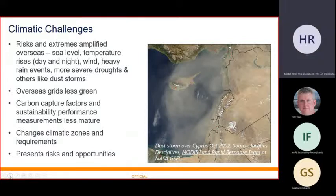We're also finding that the changing climate is adding uncertainty to our projects. So for example, in some areas of Cyprus, they have a naturally hotter climate, and so the houses currently qualify for having air conditioning. However, with increases in temperature, other areas in Cyprus are starting to hit that qualification baseline, the baseline temperatures. And that's starting to pose questions to projects, particularly when we start looking at the big projects like Apollo that is happening in Cyprus.